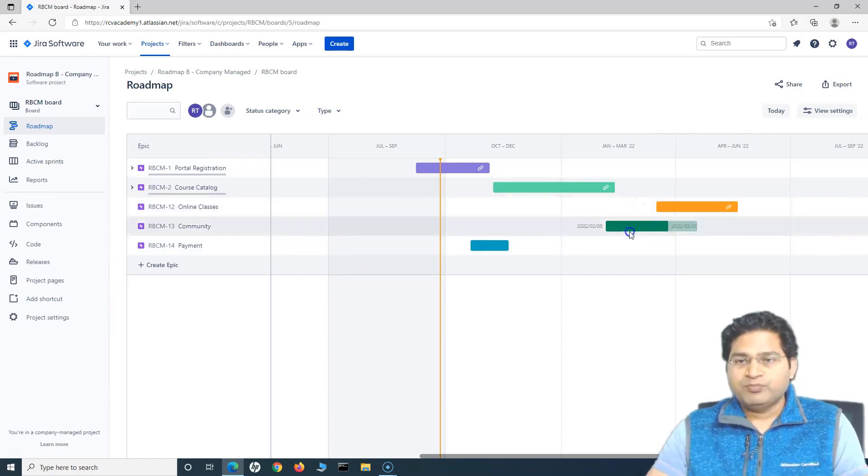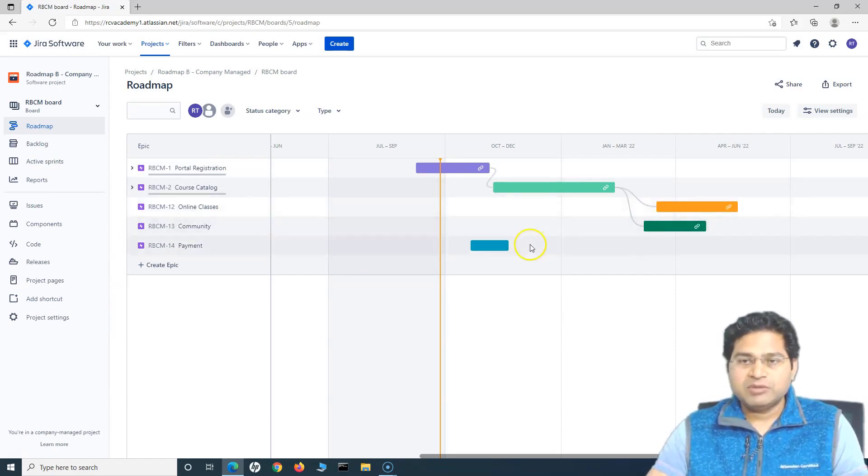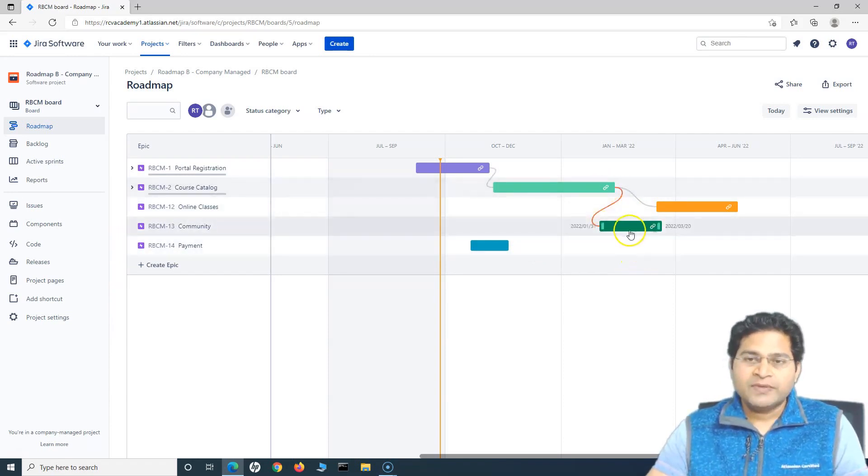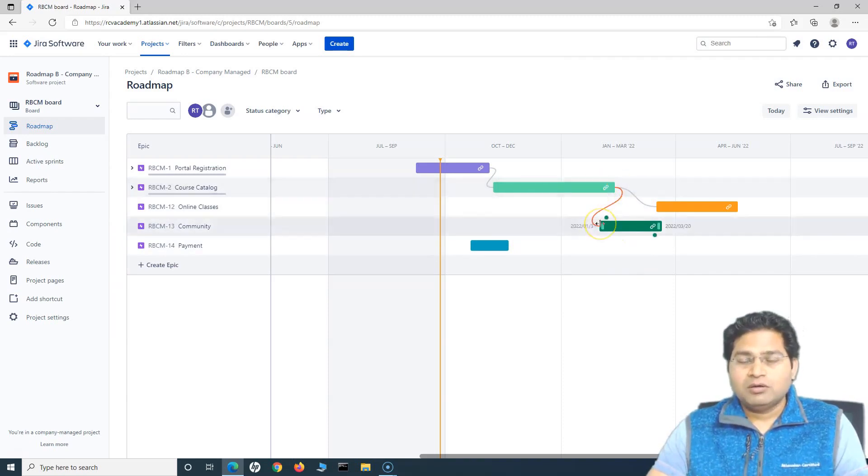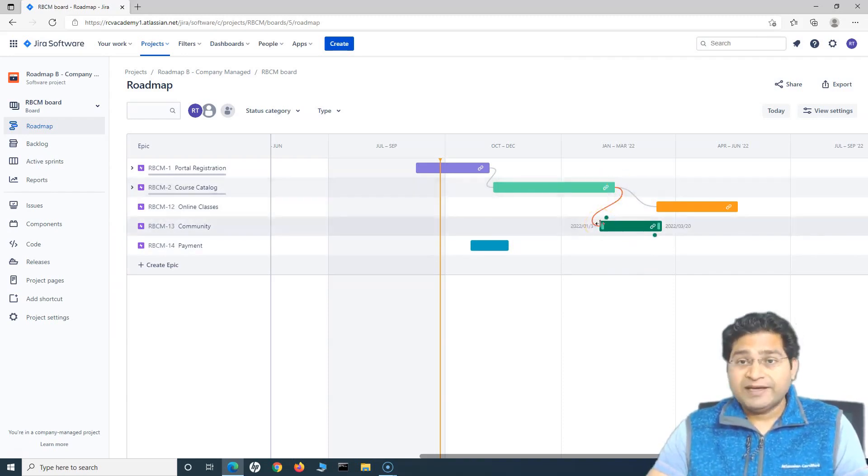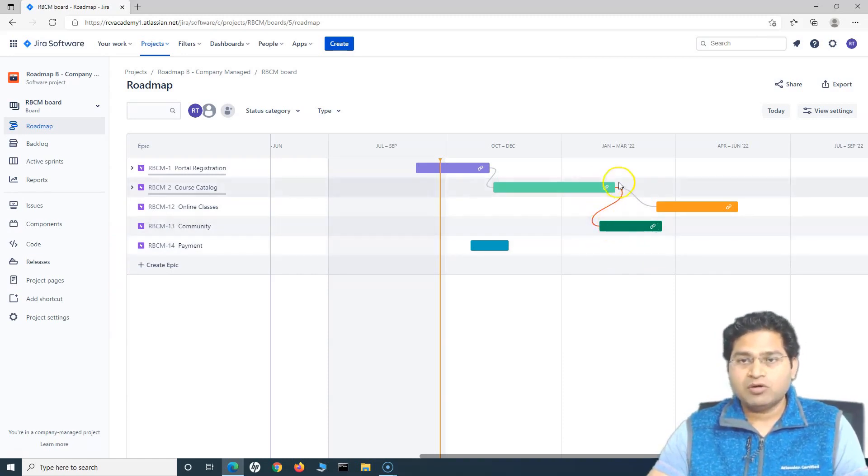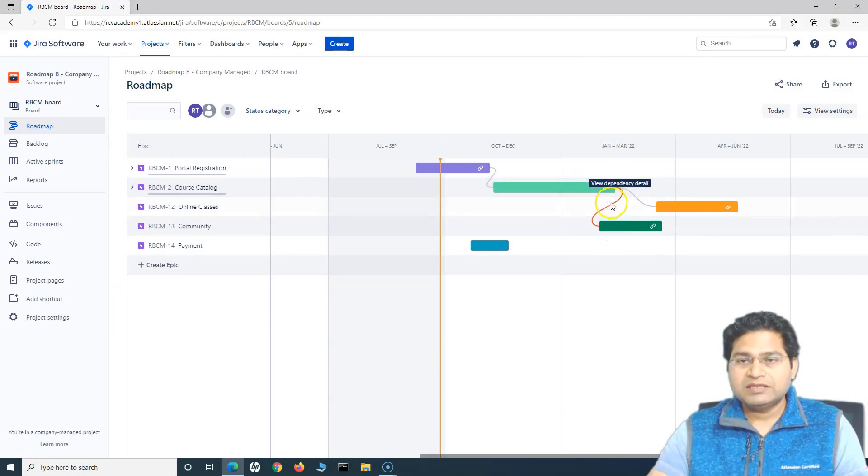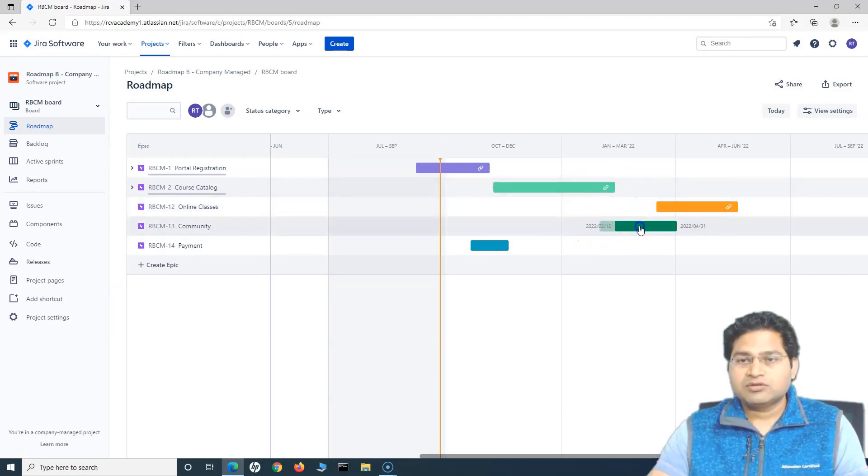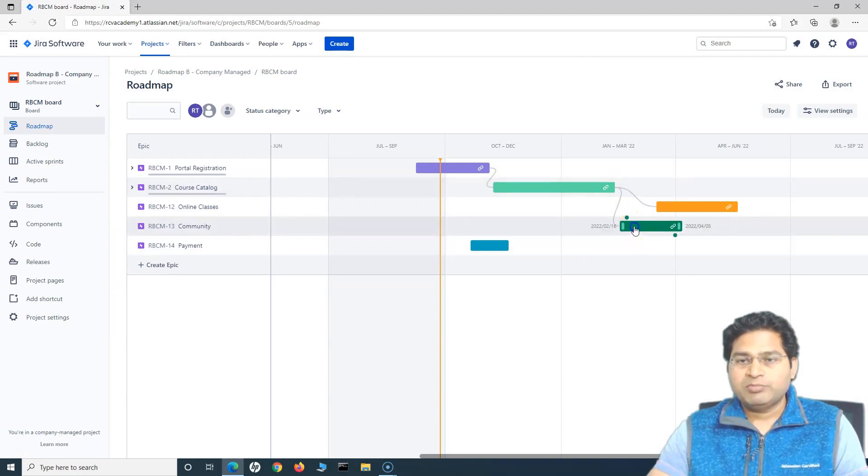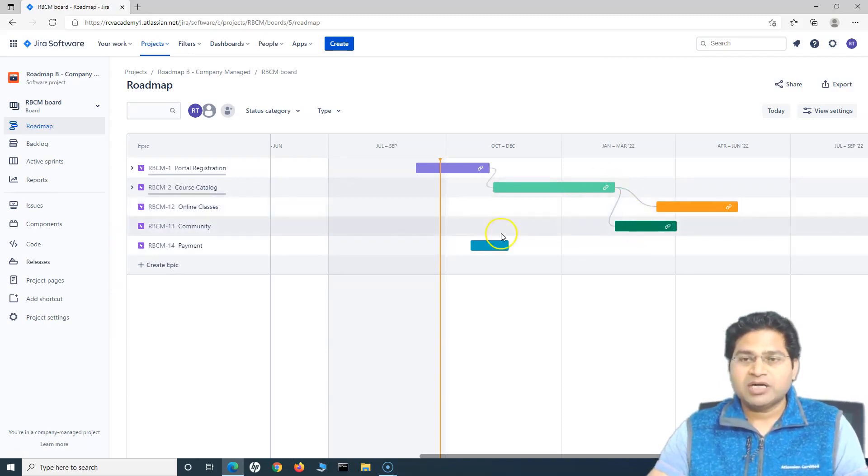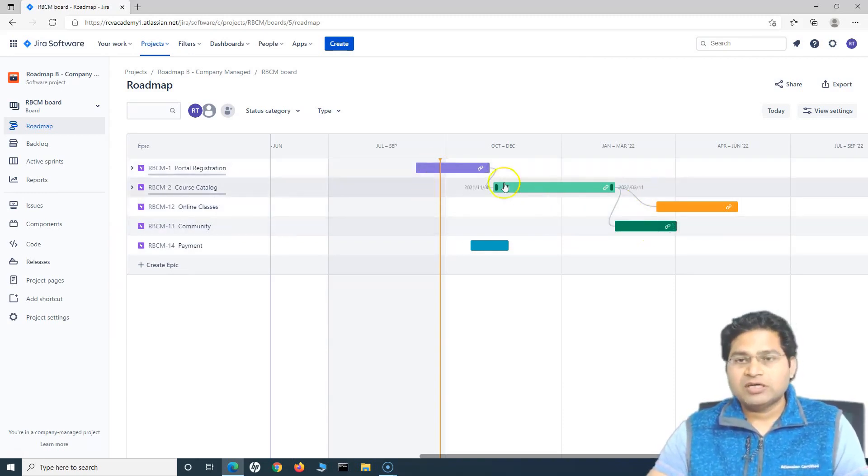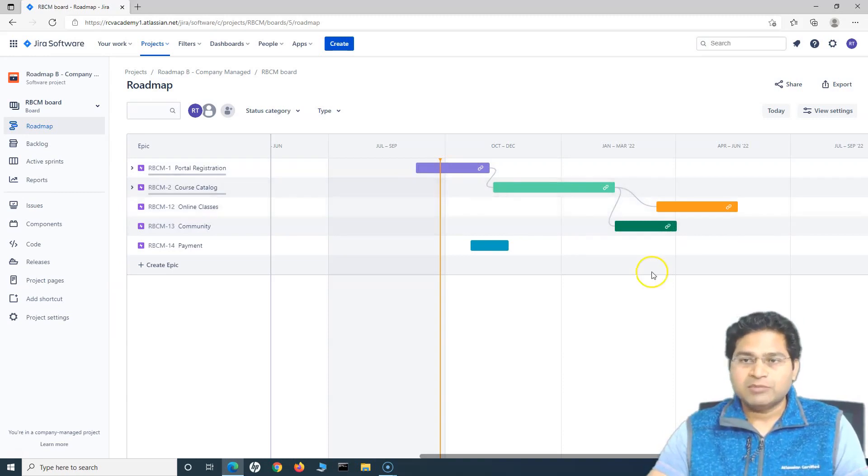Then moving it across, changing the timeline. It's pretty easy if you have the dependency and there is an epic which moves ahead of or you want to start ahead of the issue that gets finished. Because there is a dependency of this epic on the previous one, you'll see that this dependency detail will change to red. So you have to make sure that your dependencies are managed properly by dragging these work items accordingly on the timeline.